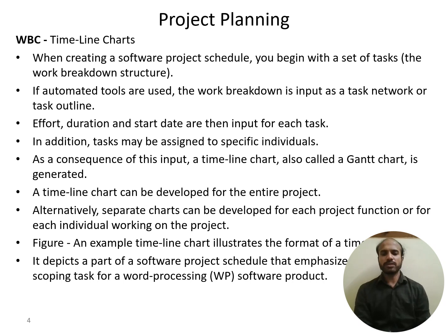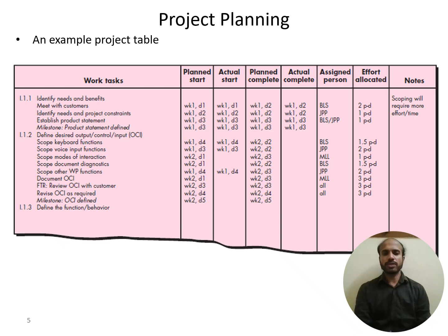It depicts a part of the software project schedule that emphasizes the scoping task for a word processing software project. You can see the set of work tasks on the left about identifying the needs and benefits, and the subtasks listed for that: meeting with the customers, identifying the needs, and establishing the product statement.